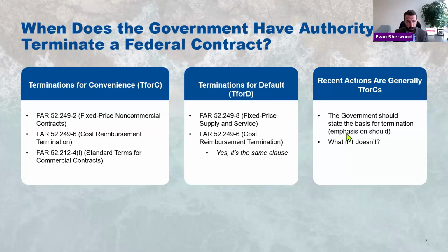The recent terminations you're reading about in the news are by and large terminations for convenience, not terminations for default. Terminations for default, of course, do not come with a right to submit termination settlement proposals. And if anything, the government may make a monetary claim against the contractor.